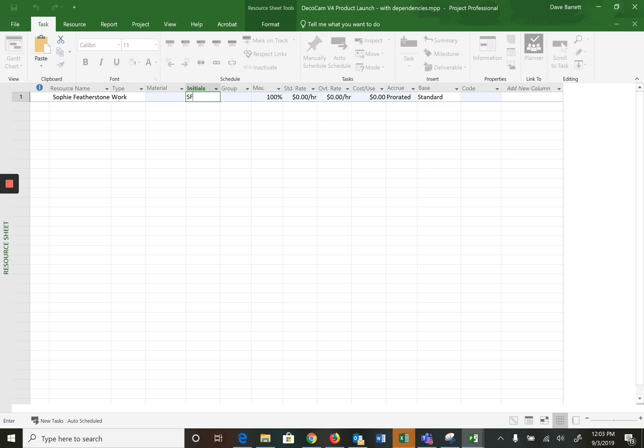It's a work resource. We'll talk about that more in another video. There's an initials column which can be used in some reports. There's a maximum field. This is the maximum amount this resource is available to the project, so 100% means eight hours per day. Now project managers in DecoCam Productions normally work on other things, not just one project at a time, so we're going to set that to be 50%.